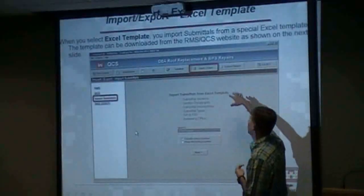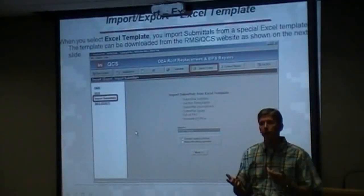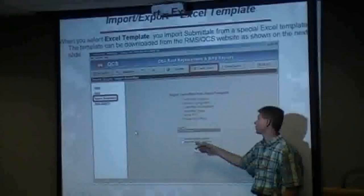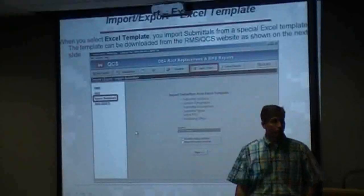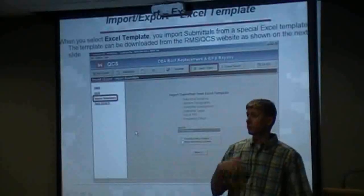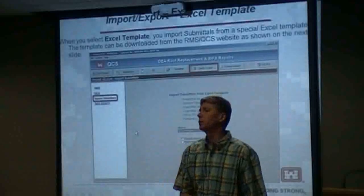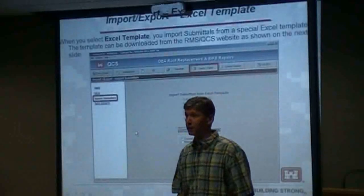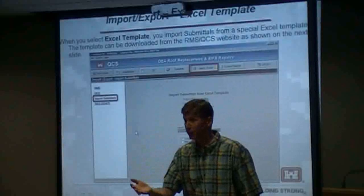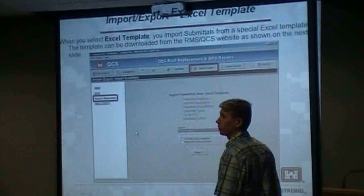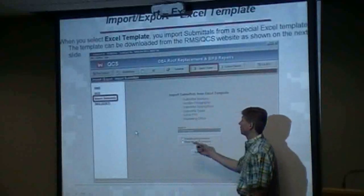Here's the submittal import-export. We briefly touched on the Excel template earlier. The first option here, which is the default, says 'overwrite existing submittals.' If you've already submitted some submittals to us and now you're importing a new register, you might want to select merge instead of overwrite — because all the submittals you already submitted to the government will be lost if you overwrite. Be careful with that when you import this register.